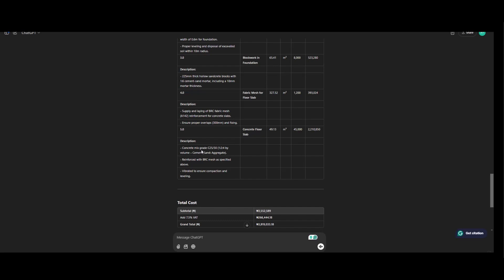Concrete floor slab. Concrete mix grade C25/13 1 ratio 2 ratio 4 by volume. Concrete sand aggregate. Reinforced with BRC mesh as specified above. Vibrated to ensure compression and leveling. So this is the total quantity.